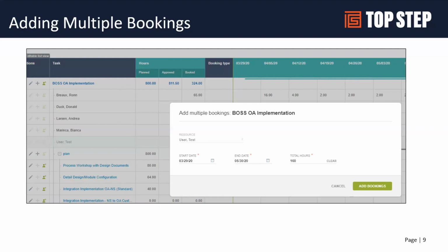You can go in here and just click. There's 3 dots on the left side of the bookings. Once you go into the center, you can create the bookings for resource, start and end date, and enter the hours. I misspoke, percentage is not available today. You are selecting hours, but this will basically peanut butter smear the hours across the periods, and then you can, as reality starts to happen, go in and update those hours on a period over period basis.